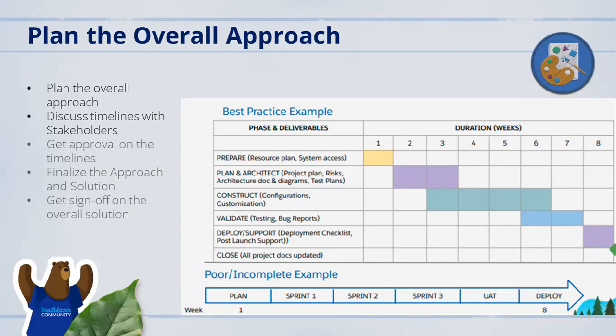You plan those out week by week, so that the client also has visibility into when each studio will be delivered, by which week they will be ready, with respect to the end to end of Marketing Cloud. That's the overall plan that you build and then follow during your implementation integration cycle. So post discovery is where you plan the overall approach, create a project plan along with the customer, and then use that during your implementation integration cycle.